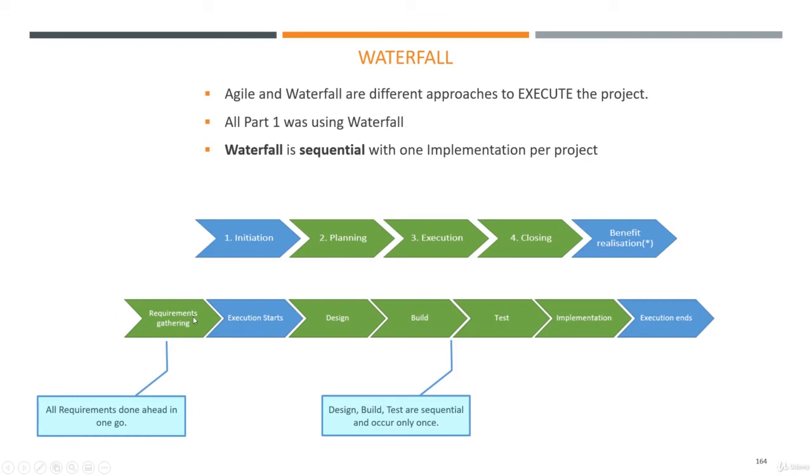If they want something different, if they want to change something here, as we've seen, we just call on the change control card. We say, sorry guys, you need to go through the change request process, and it needs to be signed off before we even have a closer look at it. So we do that once, and after we do all that once, we implement once.